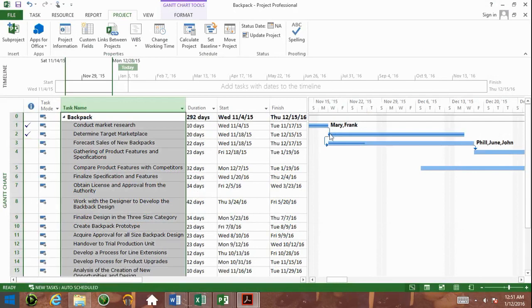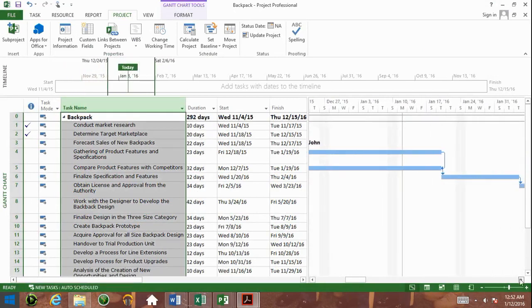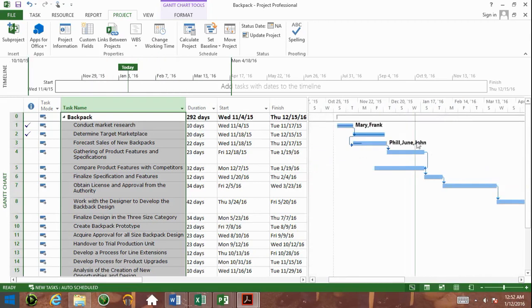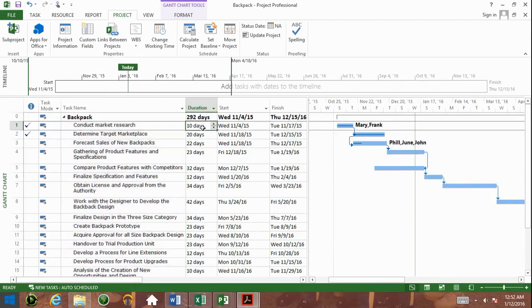We have sequence activities, making these relationships work between the activities, doing the start to start and the finish to finish. Then we have estimate activity resources. I skipped that step at first, but I went back in and I put in some resource names. So estimating the resources you need for the project. Then I put in the durations, estimate activity durations, and voila, we have a schedule.